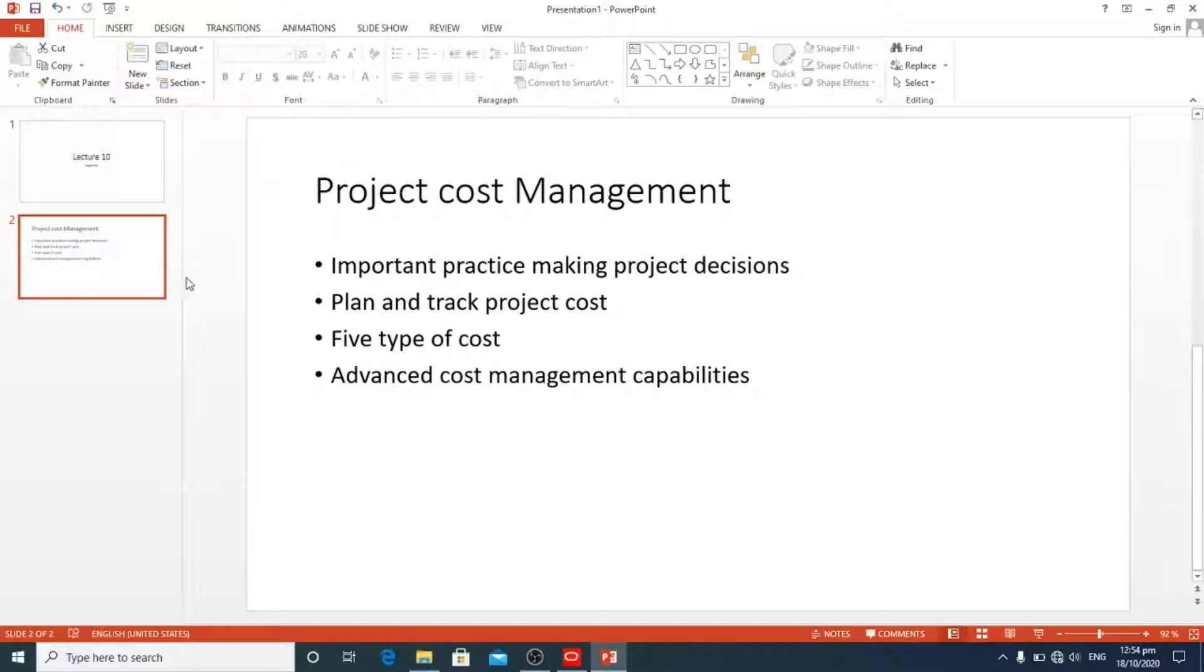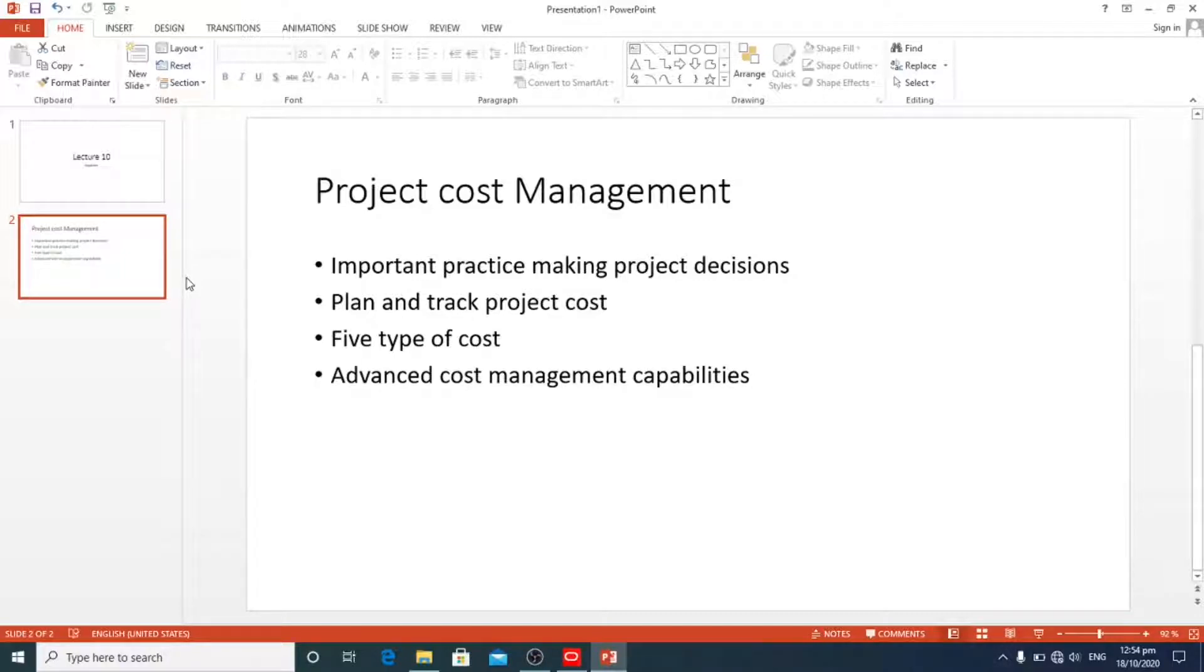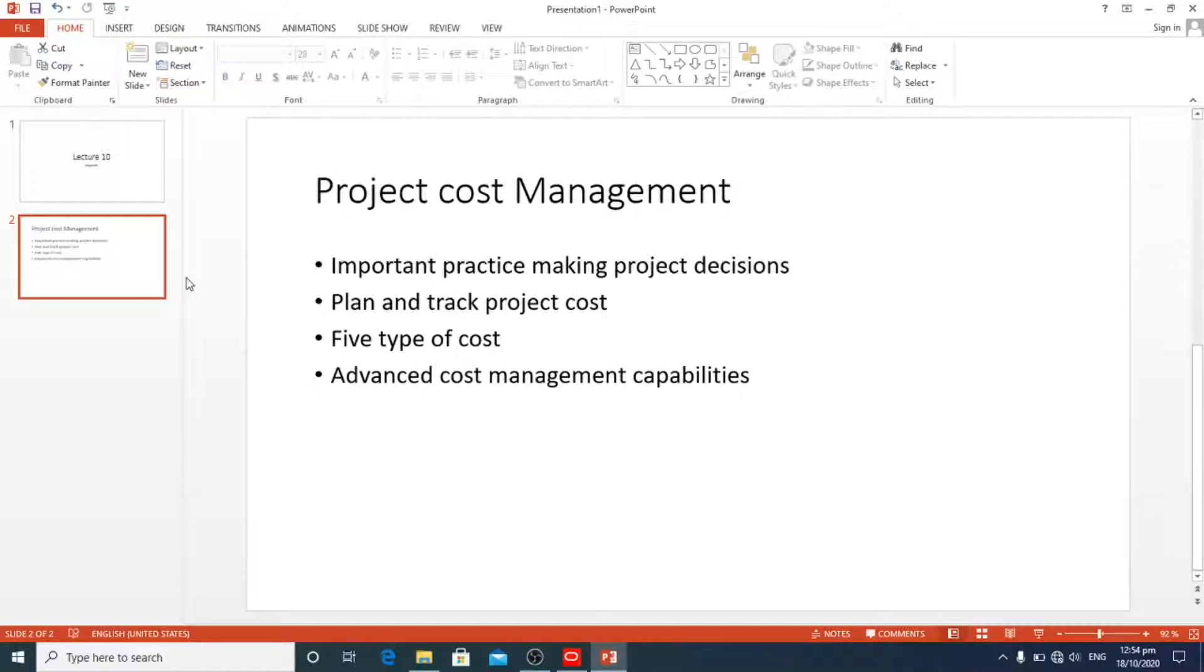Simply put, the people who do the work like bricklayers and machine operators are direct cost to the project. On the other hand, project managers whose work is supervising people are usually an indirect cost to the project.